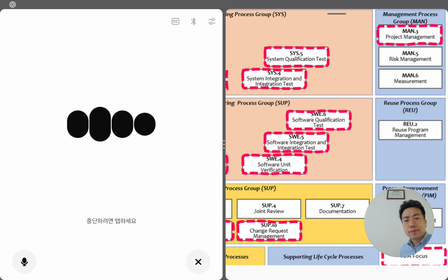Every project has its own risk landscape, shaped by what's being built, the maturity of the team, and how the company manages uncertainty. Still, most risks fall into a few broad families. Technical risk: design flaws, integration failures, unproven tech. Schedule risk: unrealistic timing, late inputs, bottlenecks. Resource risk: key people overloaded, skill gaps, tool issues. Supplier risk: late deliveries, poor quality, unclear specs. Change or scope risk: uncontrolled requests, unclear requirements. Compliance risk: missing ASPICE, IATF, or safety documentation. So yes, the specifics depend on your company's process, but the categories usually stay the same. Which type feels most real to your current project right now?